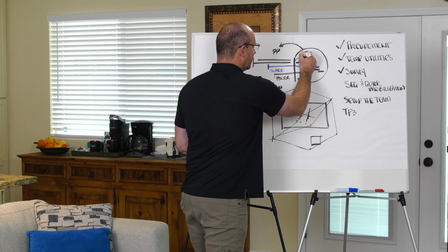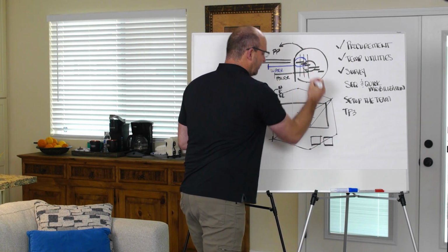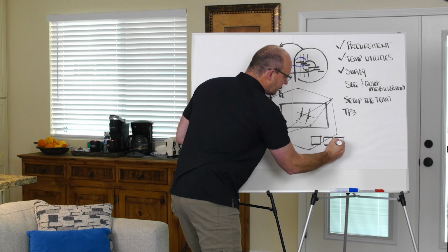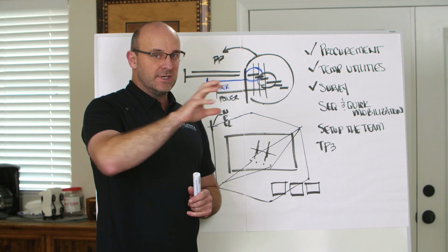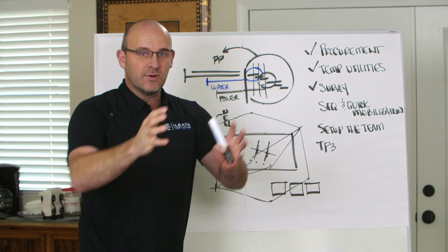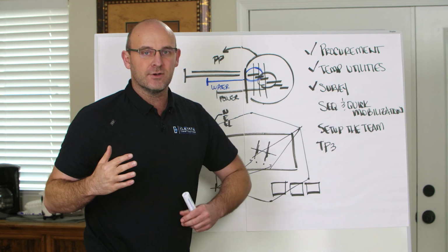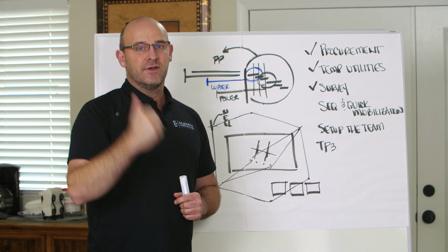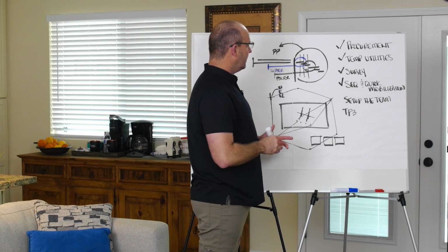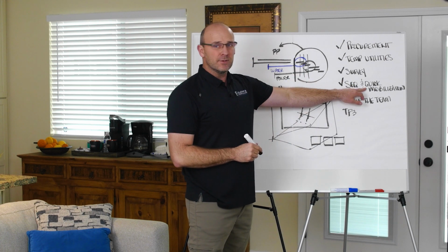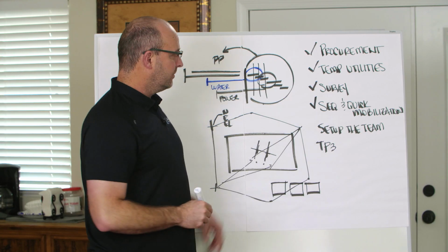And you show what that looks like. Week 2, and then you do a drawing and you see what that looks like. And then week 3, and then you do a drawing and see what that looks like. A week-by-week or day-by-day analysis to make sure that everybody's in the right spot, that we're getting grading to the first pad, we're certifying that first pad, utilities aren't in our way, and we can start foundations as soon as possible. So make sure that you're sequencing the work right out of the gate to go fast, and that you're able to mobilize quick and get going, because this is where we can gain time. That is done with a pull plan.